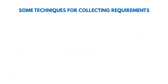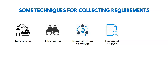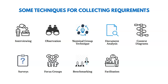Now let's talk about some techniques for collecting requirements. We might interview customers — sit down with them and talk about what they need. We might observe the customers, watching them in their environment. We might use a nominal group technique, a kind of group brainstorming. Other techniques include document analysis, context diagrams, surveys, focus groups with experts, benchmarking — comparing ourselves to other organizations — facilitation techniques with key stakeholders, and prototypes. These are all potential techniques for collecting requirements.